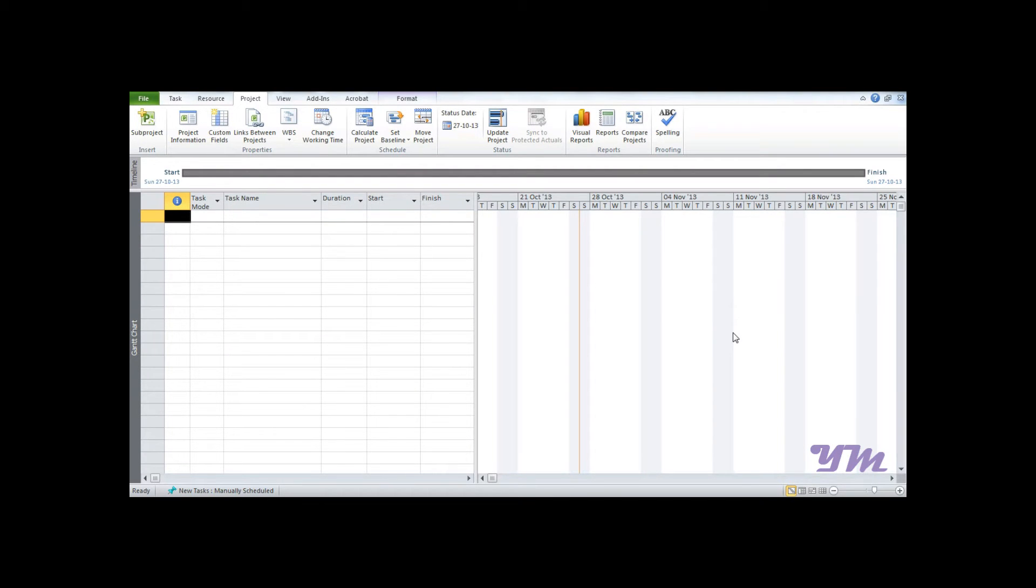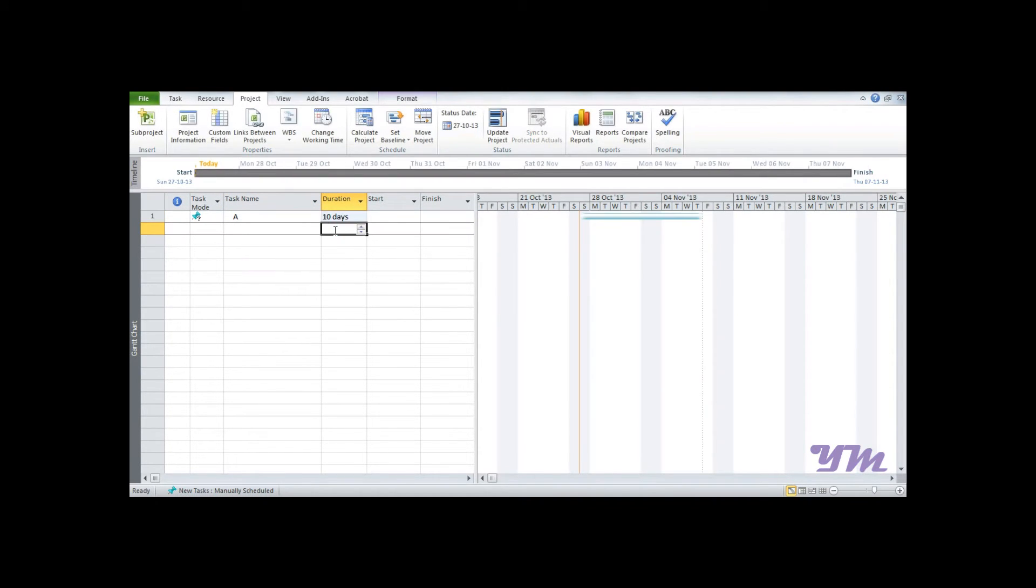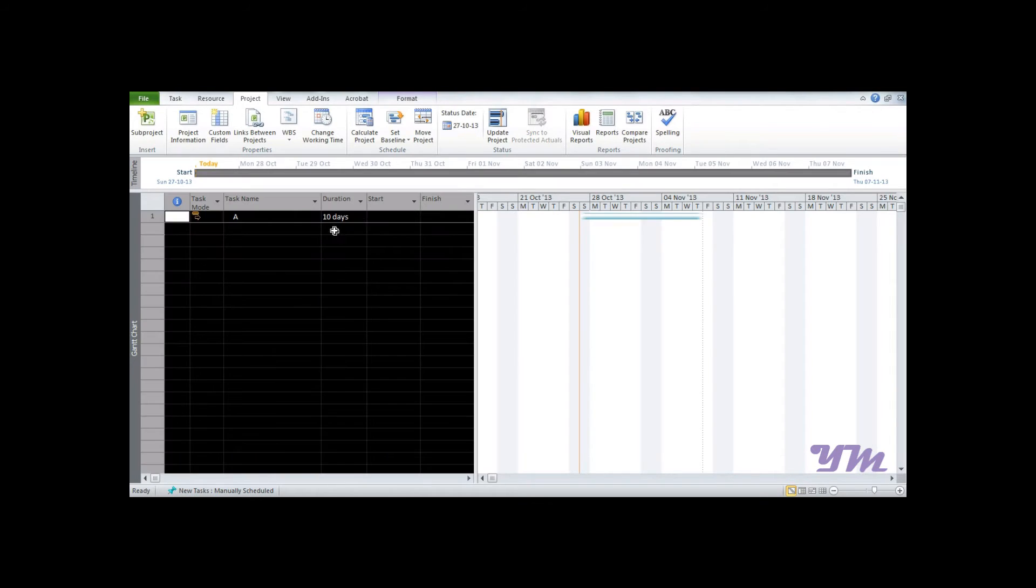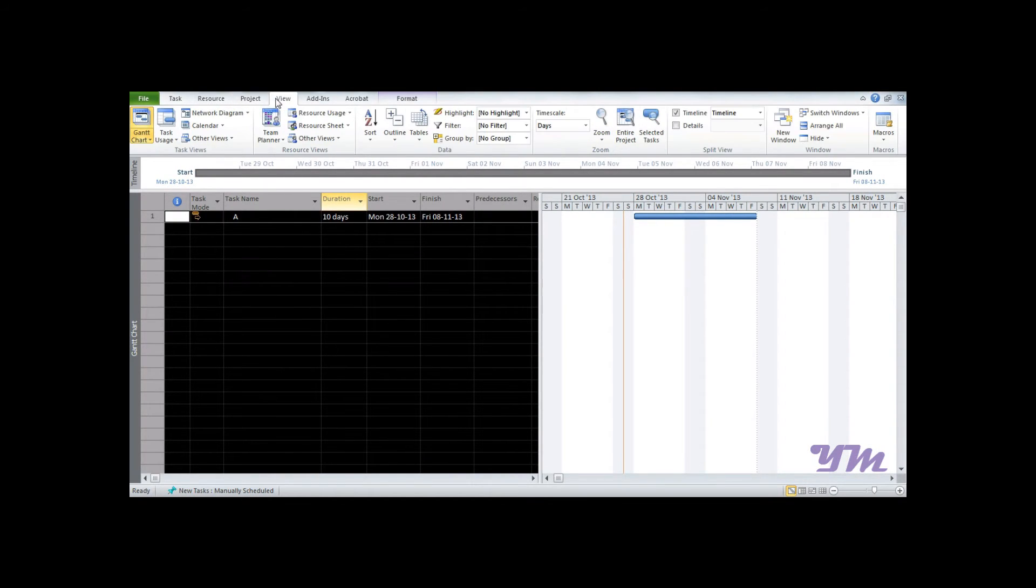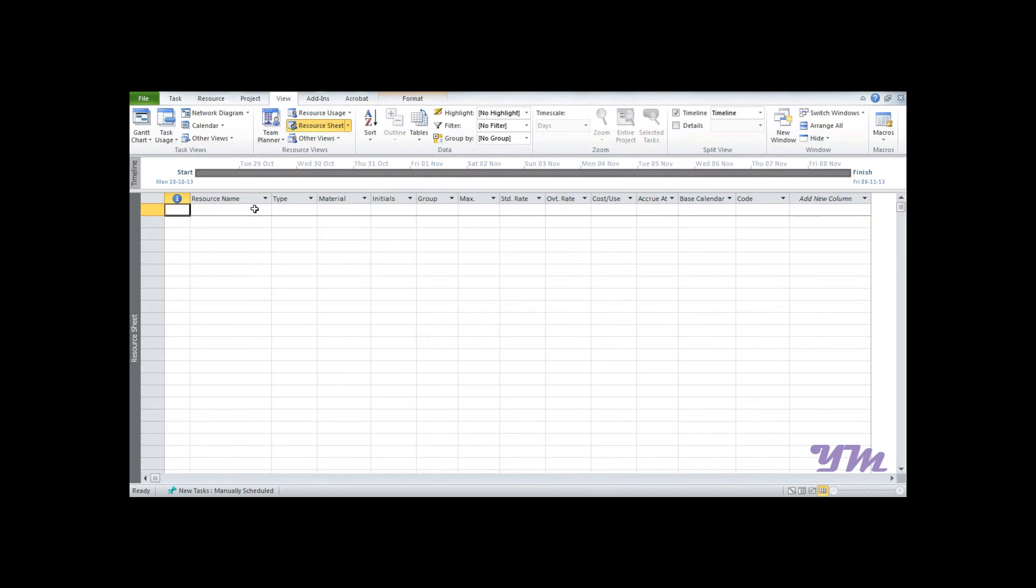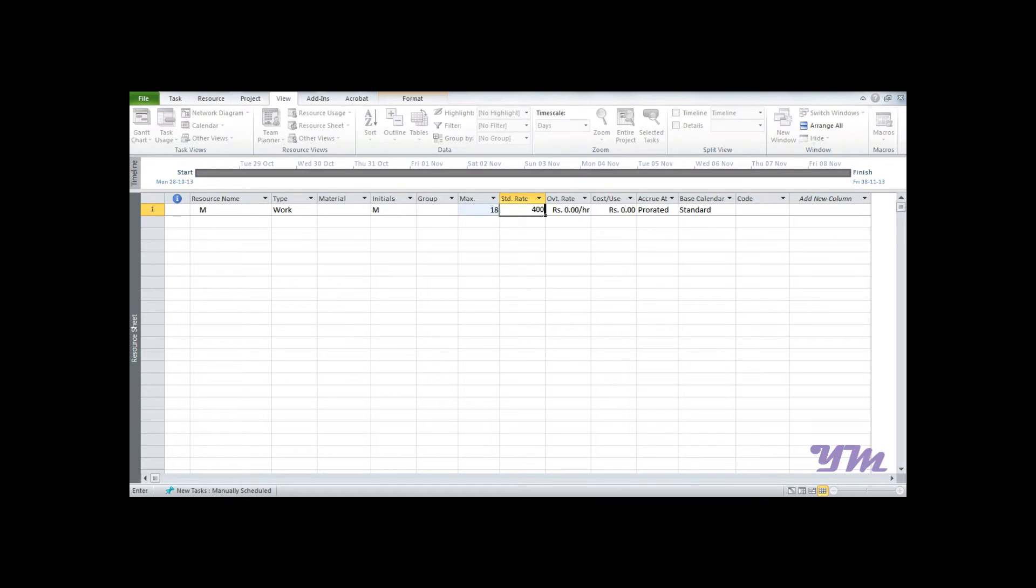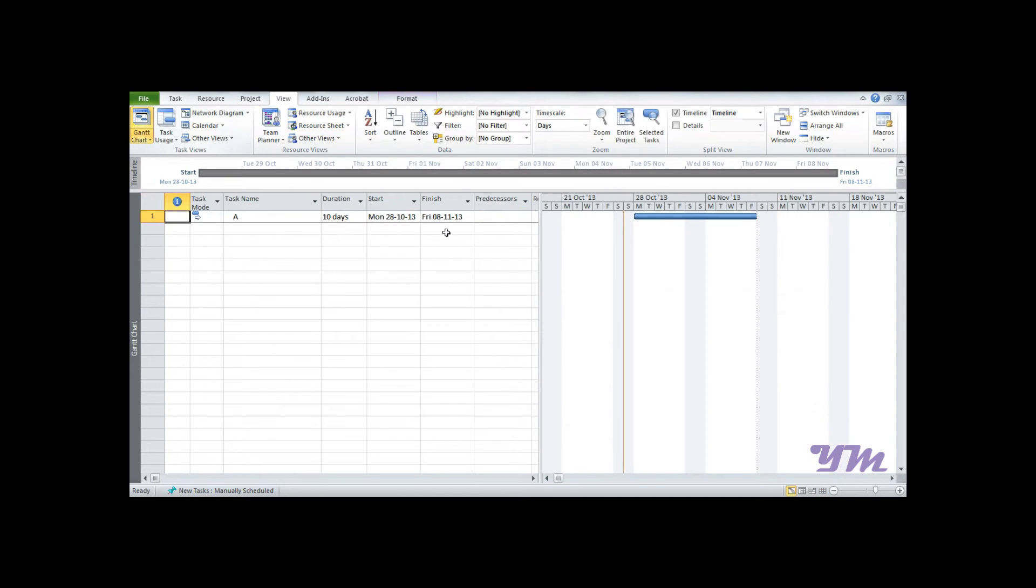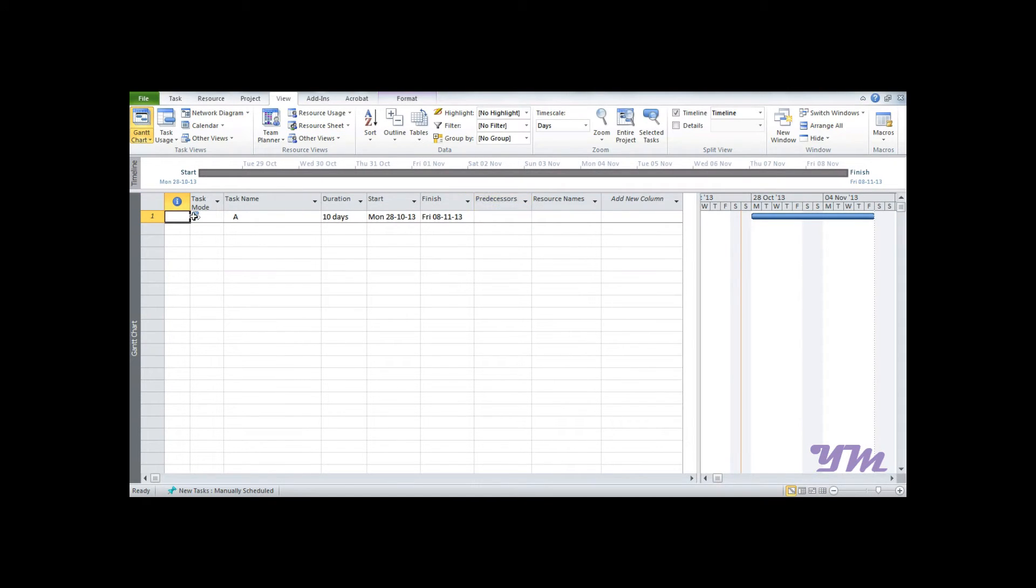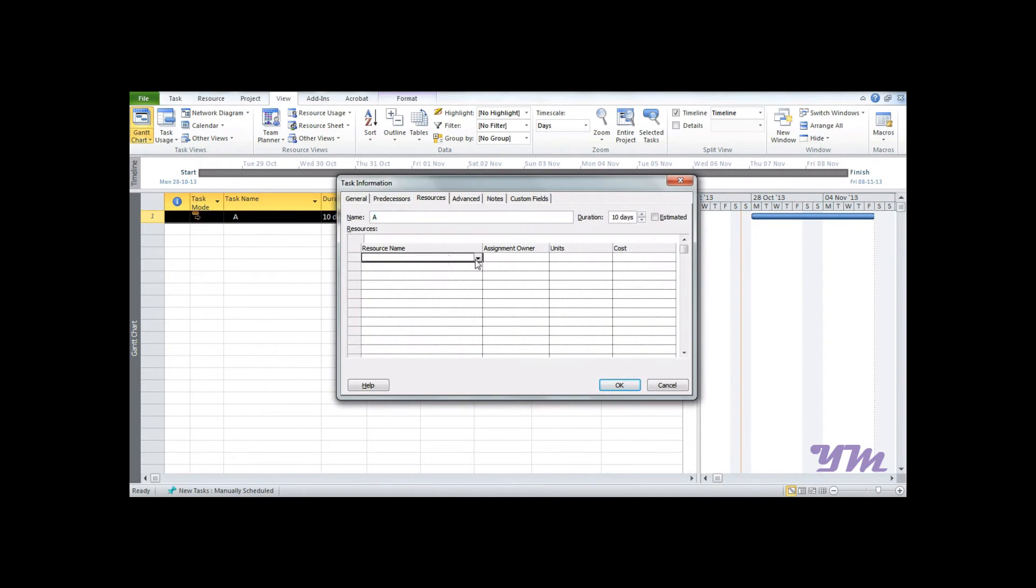Now let's do the same thing in Microsoft Project 2010. To begin with, we'll insert a task name, say A, which has a duration of 10 days and make it auto-scheduled using the macro we created recently. We'll add the resource by going into View, Resource Sheet. Say we have resource M having a maximum value of 18 and a rate of 400 rupees per day. Then go to the Gantt chart view, double-click, and add the resource M having units 10.